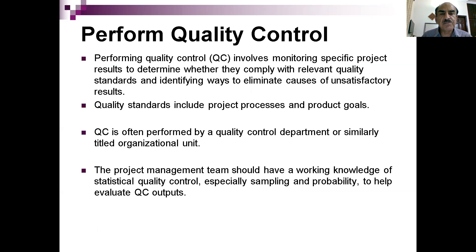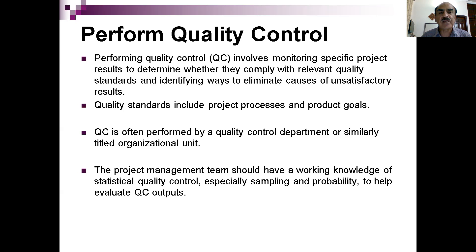The third and most important step is performing quality control. Once quality standards have been assured, we consistently monitor project results at the end of each project lifecycle phase or sub-phase. We identify unsatisfactory results, identify their causes, and take corrective actions right in time — because even if 100% quality assurance is done, we can still have quality problems at the end. This is normally done by the quality control department or similar organizational unit. The project management team should have a working knowledge of statistical quality control, especially sampling and probability, to help evaluate quality control outputs.